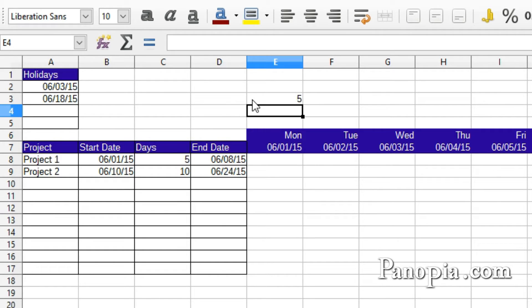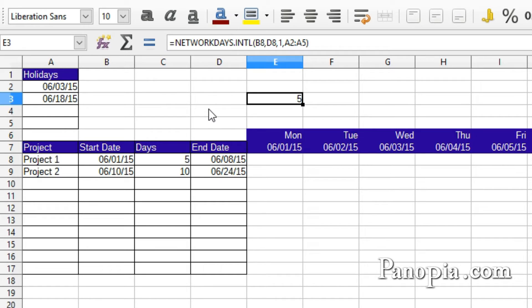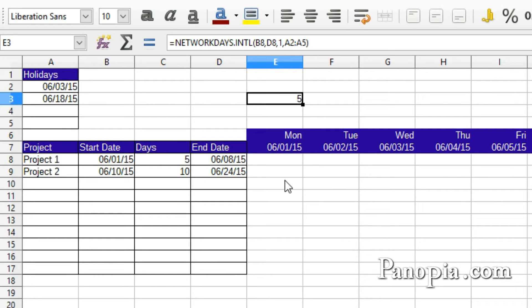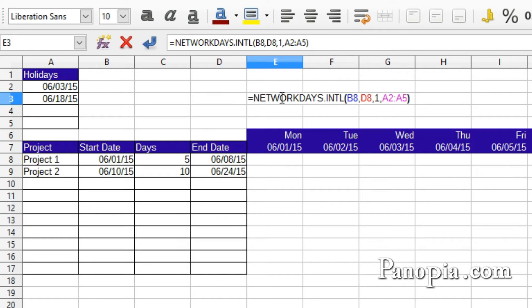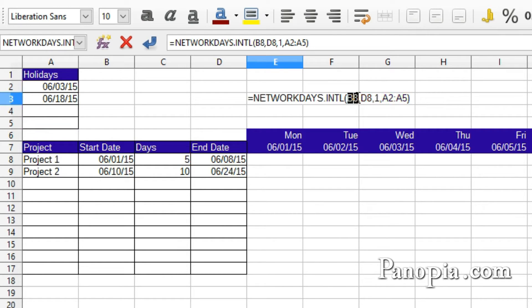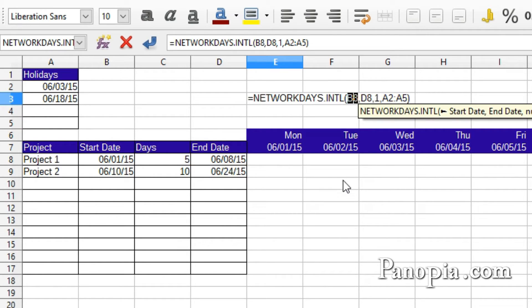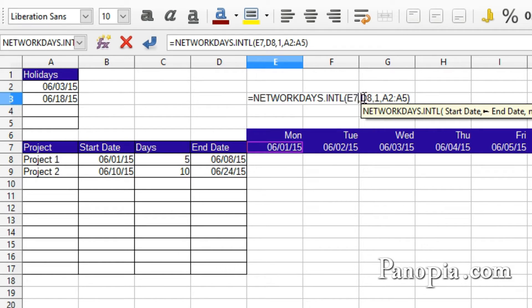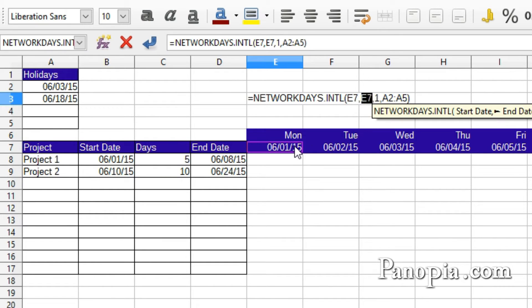I'm not going to use it to find the number of days though. I'm going to use it to tell me if a date in the chart is a workday or non-workday, like a holiday or weekend. If you give it the same date for the start date and end date, it will return a 0 if it's a holiday and a 1 if it's a workday. I'll double-click E3, select the first parameter, and click E7. Now I'll select the end date, and click E7 again. Then press Enter.